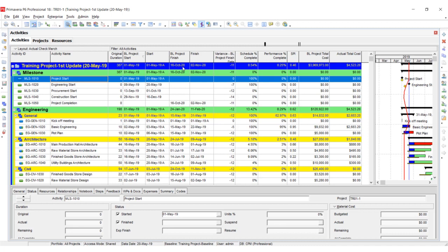According to the progress update, we are expecting that our project is going to finish on 2nd November 2020, and we are 11 days behind the schedule. And our schedule performance index is 0.46. It means that we are more than halfway behind what we have planned. Against the plan of 0.54 percent, we have completed 0.25%. It means that we need some more manpower and a mitigation plan against this lag, so that we can complete the project on time.